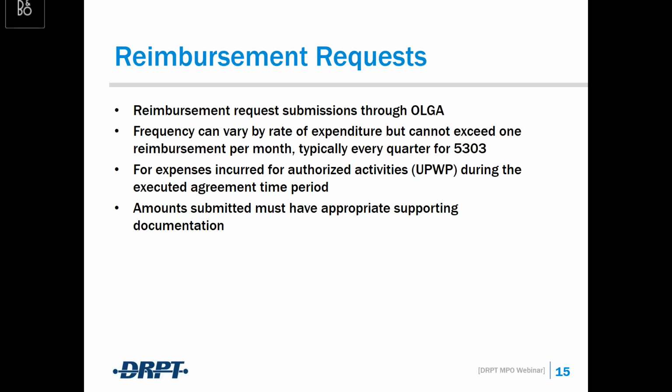Expenses incurred must be for authorized activities, which are listed as tasks in your UPWP during the executed agreement time, and amounts that are submitted must have appropriate supporting documentation. And I'll go over that in just a little bit.